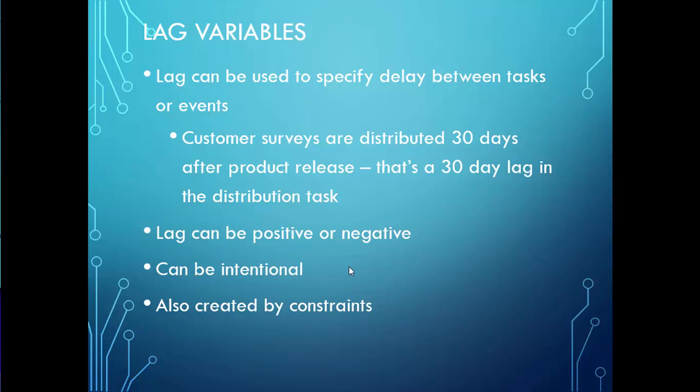That means, if instead of starting from day 1, I can start from day 2 or day 3, that will be fine, because still after the second day, I can add 4 days for duration, and I will get 6 days. After 6 days, it will be critical. I will not be able to pass that time, and it might affect project execution or project progress. So I have to make sure that I'm within the lag time that's given to me to finish that activity.